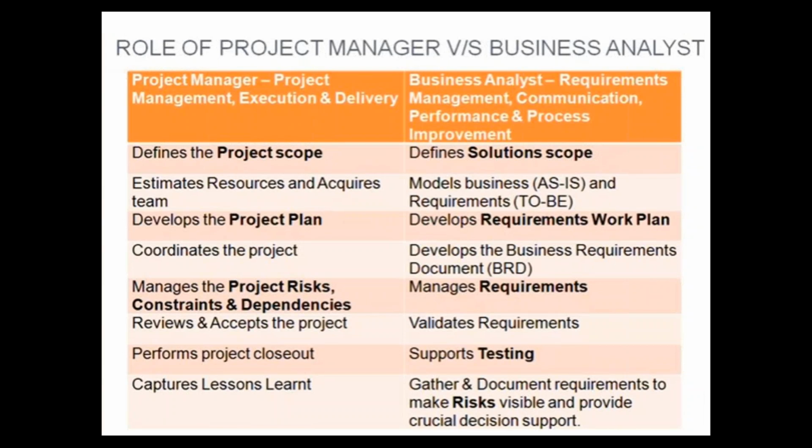Because you would have planned billing, you would have paid your employees, hired resources, etc., based on whatever is the amount you have agreed. $200,000, 1 year project. And if there is a slippage in the schedule, and the final delivery date of the software is extended by 1 week, 1% or 2% of $200,000 will be reduced, which is a loss.